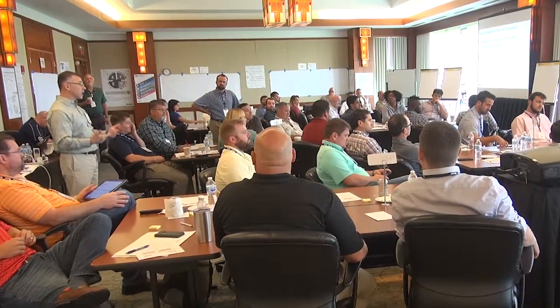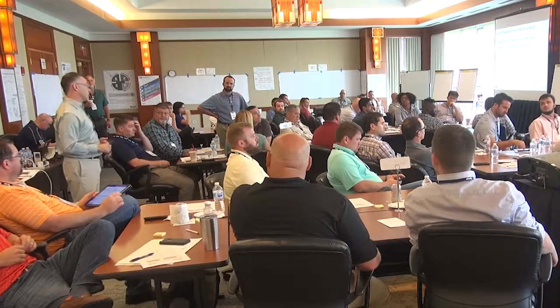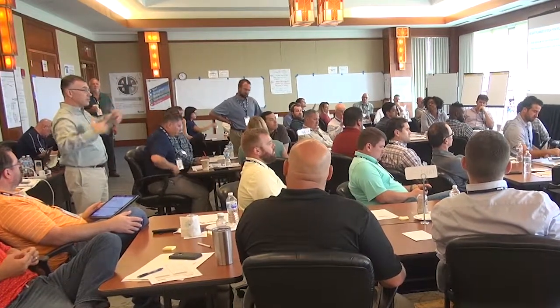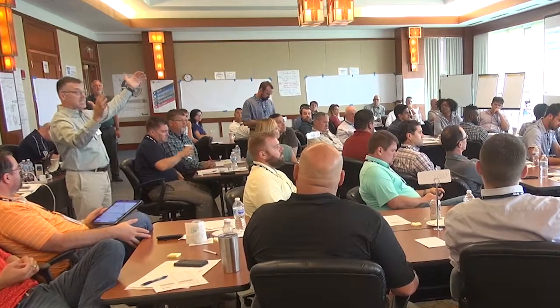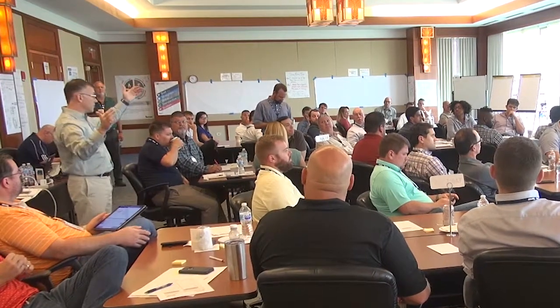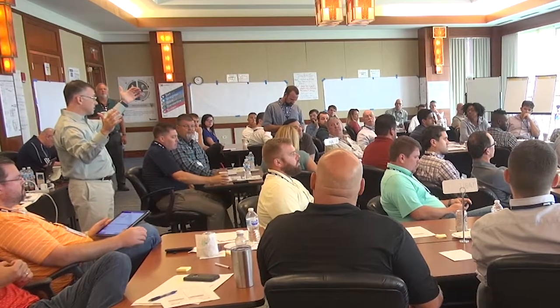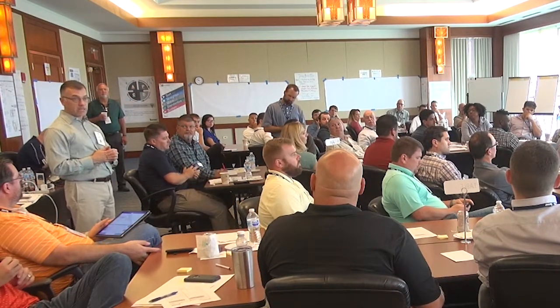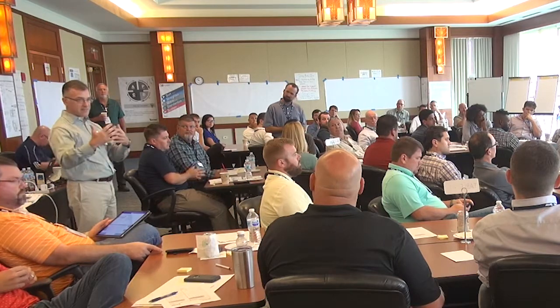We have to feel comfortable we can achieve those milestones. And to Doug's point, we've done that due diligence, gone out to the bid market with a schedule, and bought a schedule from contractors. So when we get to full planning, they can't come back and say, well, now we can't do it. We're not going to get into that with them.